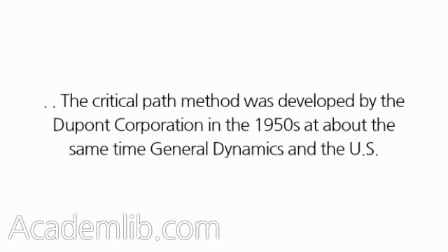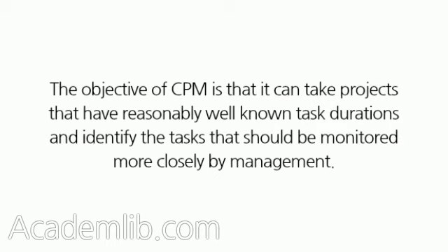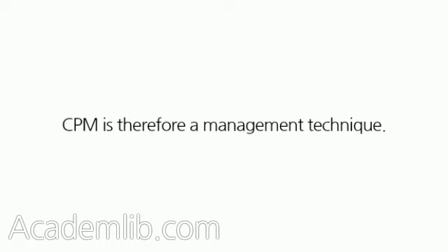Tell me more. The critical path method was developed by the DuPont Corporation in the 1950s at about the same time General Dynamics and the U.S. Navy were developing the program evaluation and review technique, which will be discussed next. The objective of CPM is that it can take projects that have reasonably well-known task durations and identify the tasks that should be monitored more closely by management. CPM is therefore a management technique.